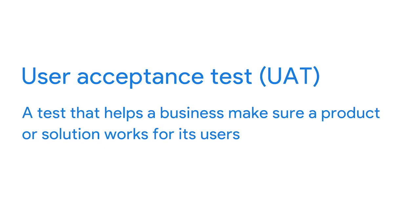Alternatively, you might conduct user acceptance tests. A user acceptance test, or UAT, is a test that helps a business make sure that a product or solution works for its users. A UAT must meet the agreed-upon requirements and deliver the expected results. This test is typically used to assess the end-to-end experience for the user of a new process or product, and takes place near the end of a product's development as an overall user experience test of the entire product, software, or service. UATs are sometimes referred to as beta tests.